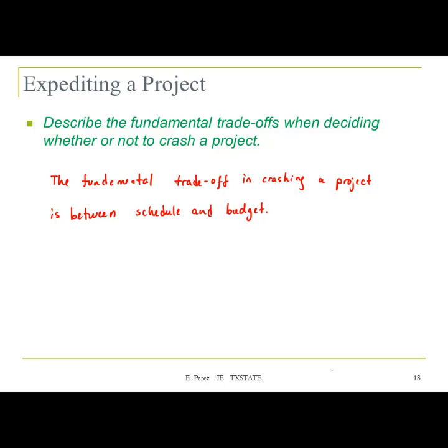So we are assuming that we are not changing any of the requirements of the project, and when crashing the project, we are just trying to deliver the results in less time, but we know that by doing that, by crashing each activity, we're going to incur an extra cost, which is going to be affecting our budget.